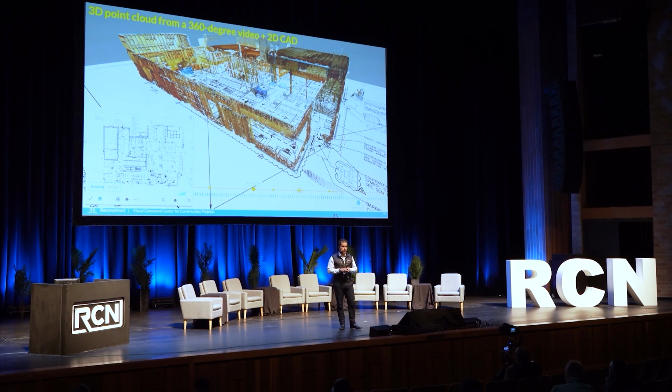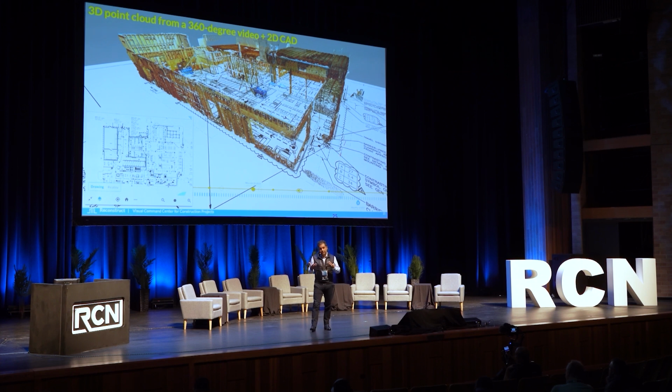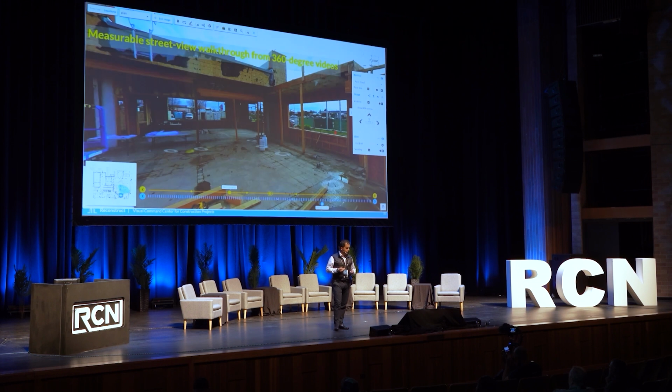Now, over time, we've actually scaled this capability. This is the most dominant form factor of capture that we see coming to us. Here's an example of a very small site, but the beauty is that this client ended up using our solution on 650 different stores at the same time over a span of roughly 3 months. So it was a massive undertaking, and all it takes is you just provide a 360 camera to someone, they walk around and document it, and you see the point cloud from the 360 video overlaid against the 2D.